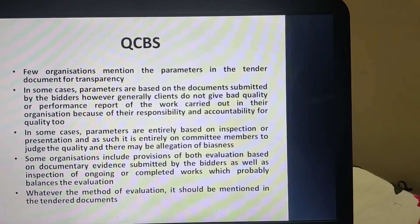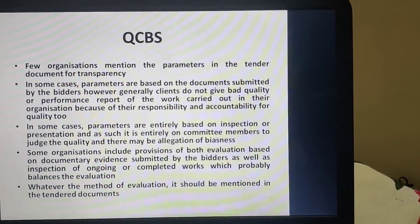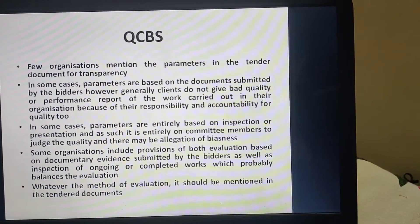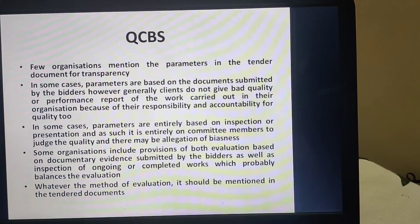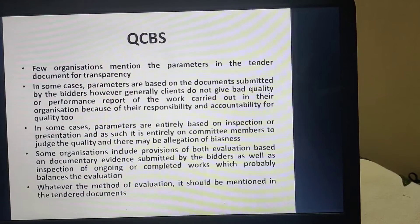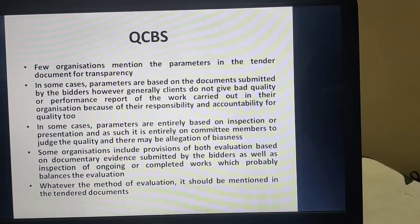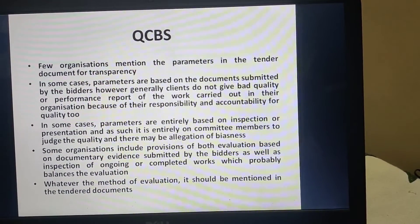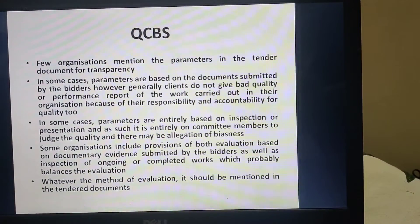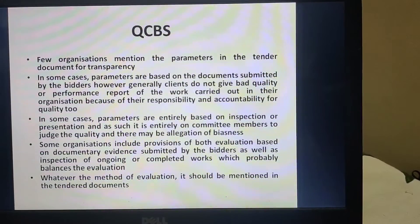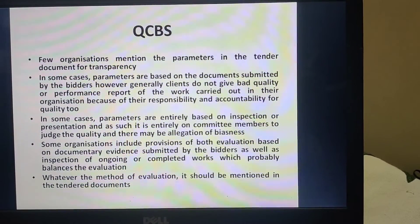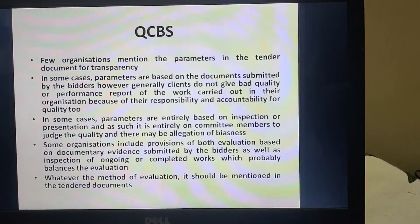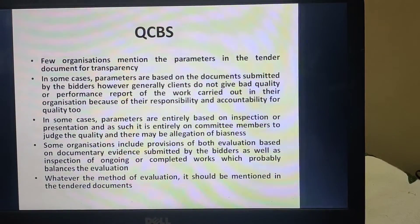Few organizations mention the parameters or attributes in the tender documents for transparency. In some cases, parameters are based on documents submitted by the bidders. However, generally clients do not give bad quality or performance reports of work carried out by themselves, because otherwise responsibility and accountability will come on them. Therefore they give better performance reports and we cannot assess the actual quality.